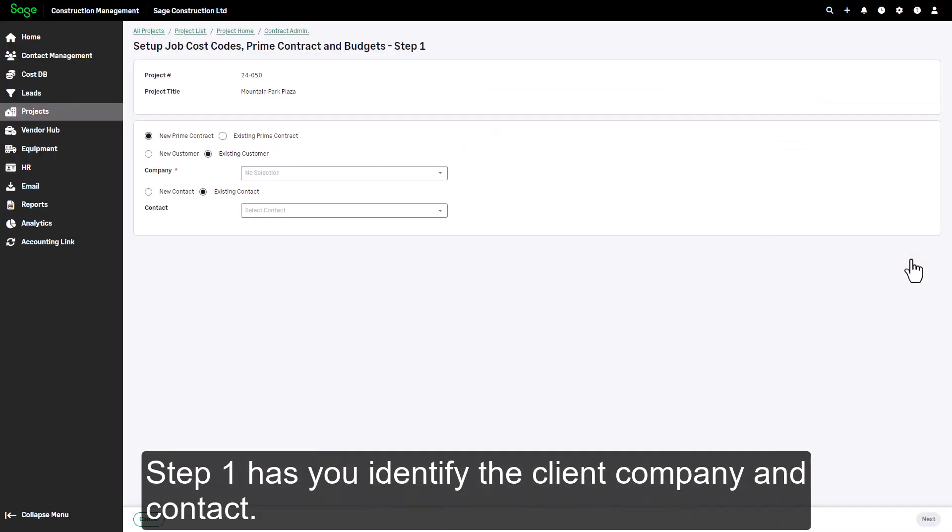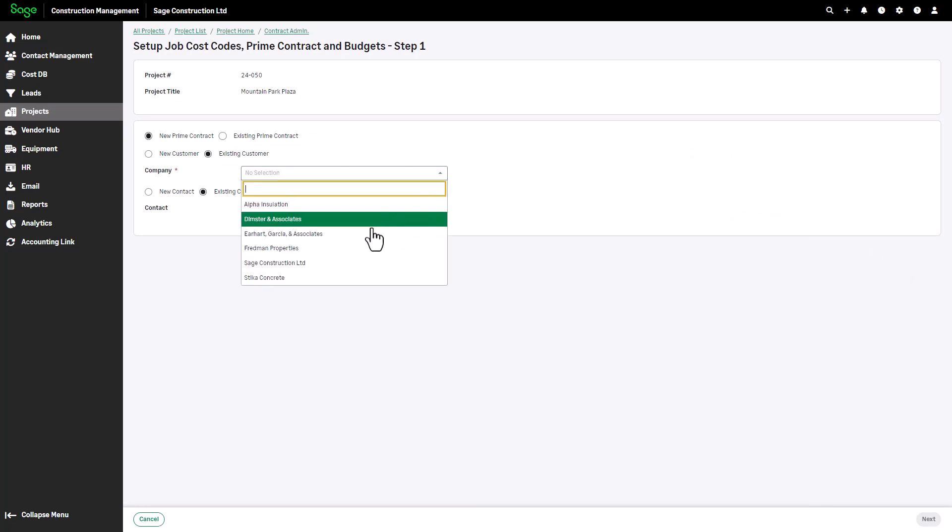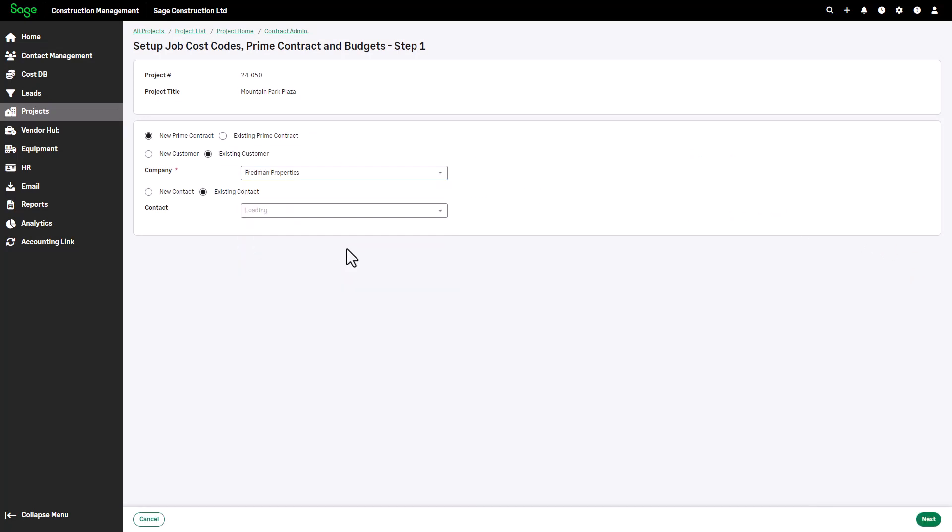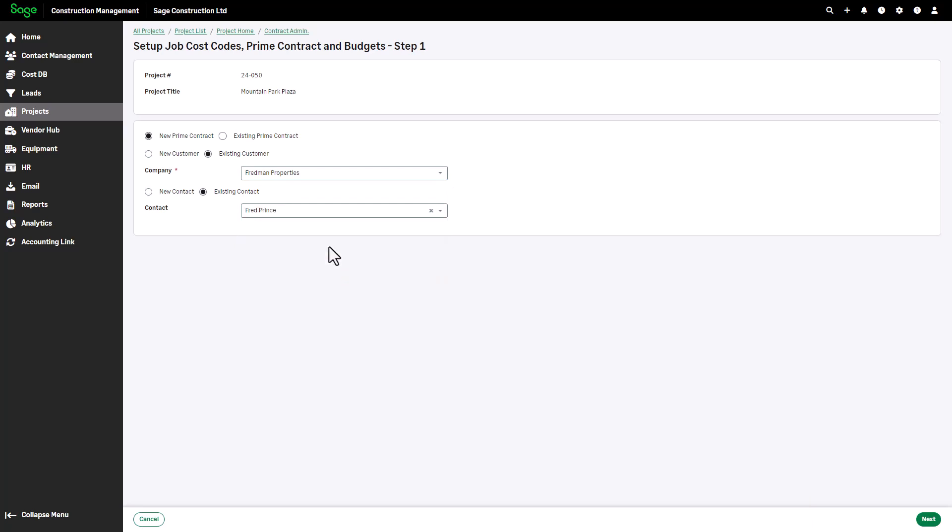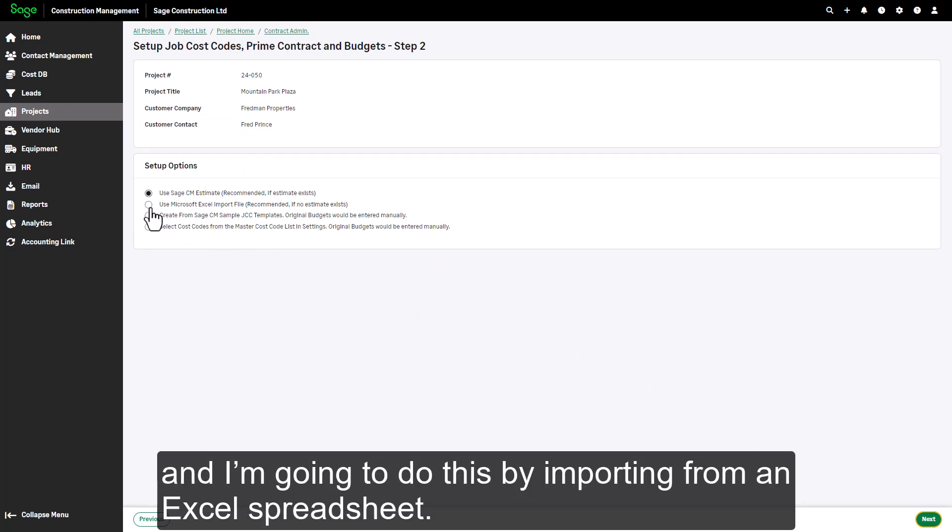Step one has you identify the client company and contact. Step two lets you indicate the source of the cost codes, and I'm going to do this by importing from an Excel spreadsheet.